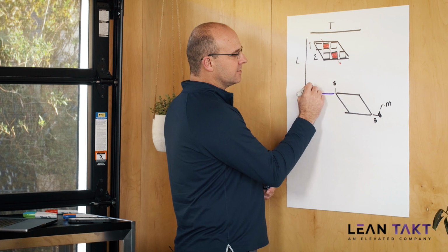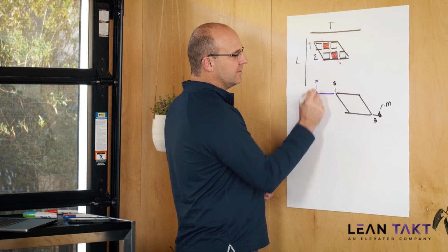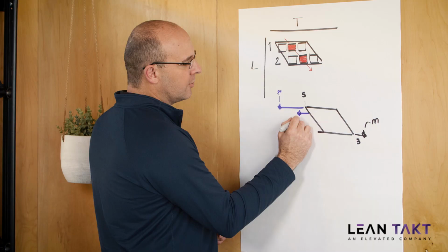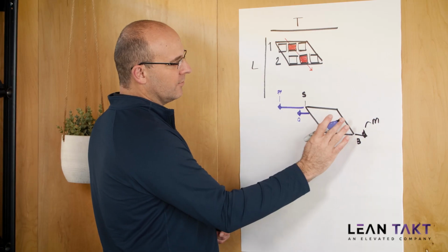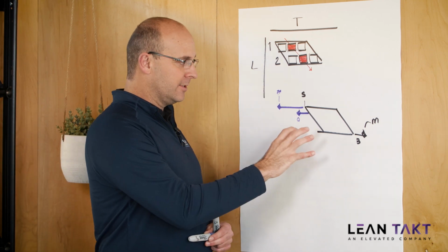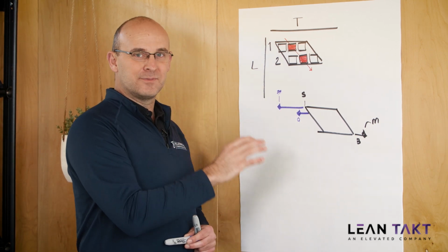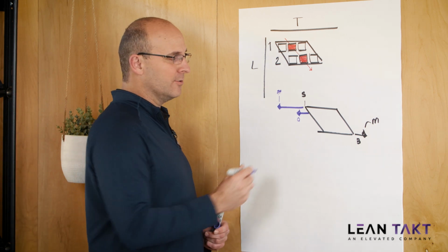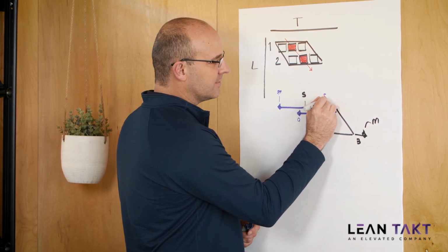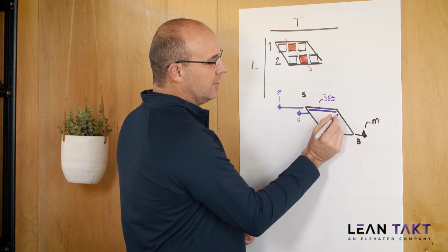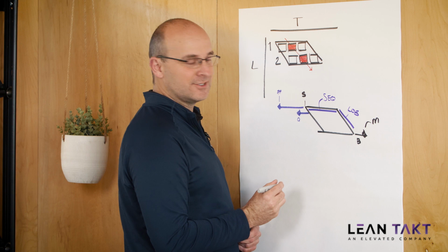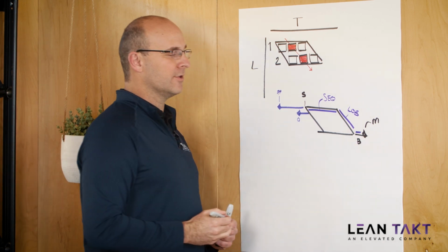So let me do just a little milestone here that says pull plan. And about 3 weeks ahead, I will start doing quality meetings for any of the wagons. Now, this creates the framework for our takt planning in construction. It's really quite cool. So in the shape itself, you have this sequence, so I'll just write SEQ. You have over here your line of balance, which is how fast you're going. And then, like I said before, the buffer.